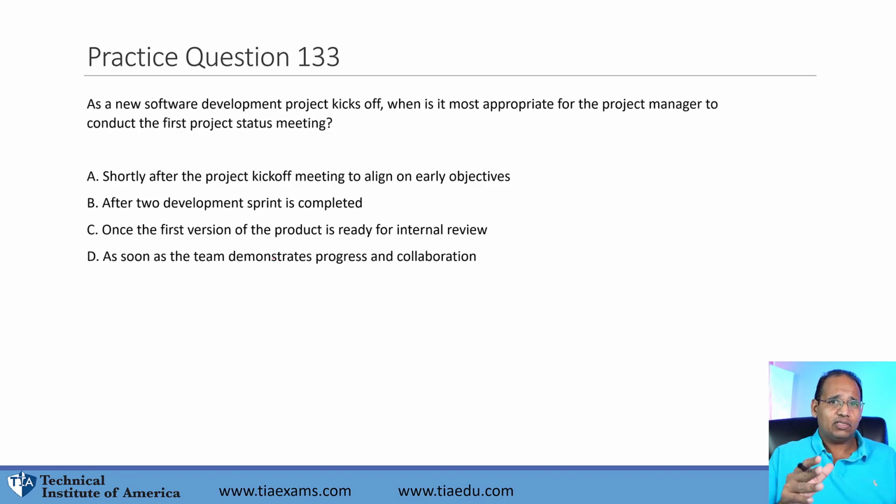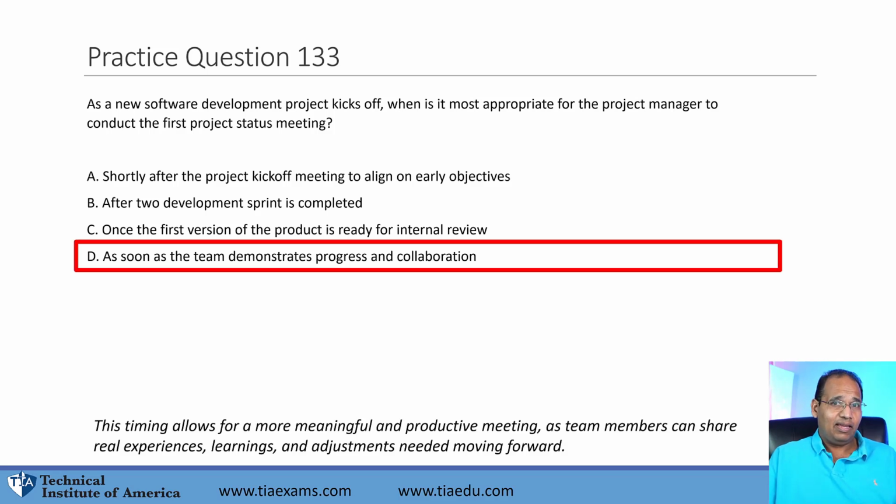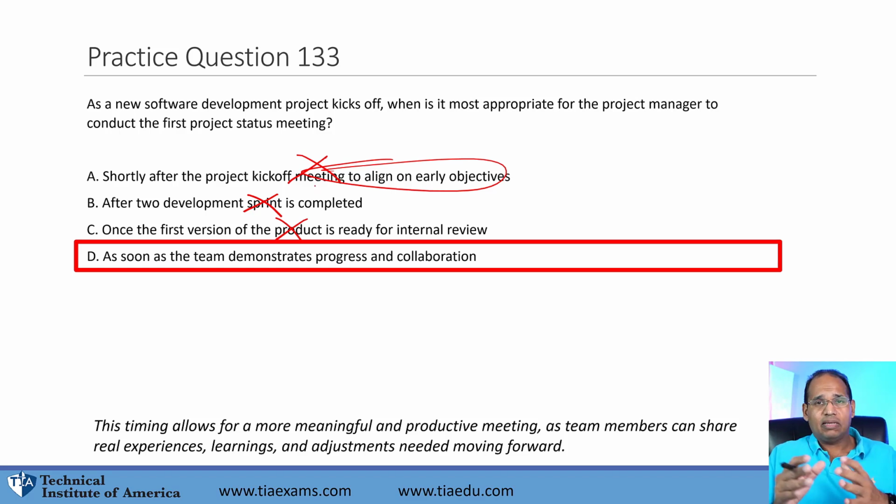All right, this was a tough question. It really had two good answers, and that was either A or D. Now, you don't want to wait for sprints to be done or an entire first version. That's going to take a long time. It really comes down to whether you should do one shortly after the kickoff meeting. Well, the kickoff meeting is about aligning to the project objectives. You don't need it right after that, but the moment the team starts to demonstrate progress, the moment the team starts to work on the product, now you have something to report on.